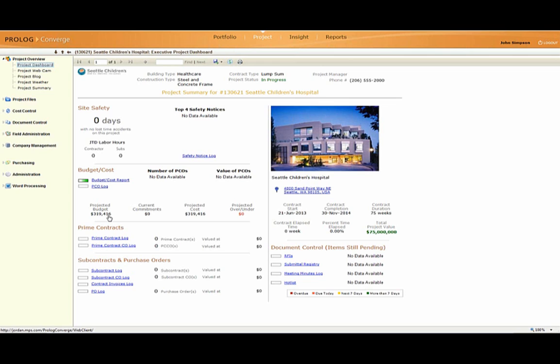When I was in project controls working for a big EPC contractor, we used to do things like this all the time. We used to work with our estimators, pull over our estimates, code them all against our project budget, and then roll it up, pull it into the actual control budget. And that process, the first time would literally take a week or two. And then every subsequent revision would typically take hours if not days. So it was a fairly labor-intensive process that we had to do for every single project, whether we were just bidding the project or whether we had actually won it. And what Steve just demonstrated is how this same process that used to take days or weeks now happens in literally seconds.